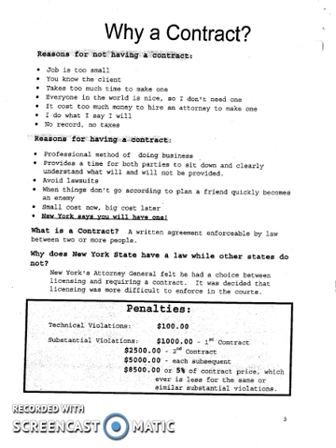So jumping down to reasons for having a contract, the most important one here is that New York State law says you must. So every contractor in New York State must have a contract with the owner when they are providing work for them. So anytime there's an exchange of money to do work, you must have a contract to be in compliance with New York State law.